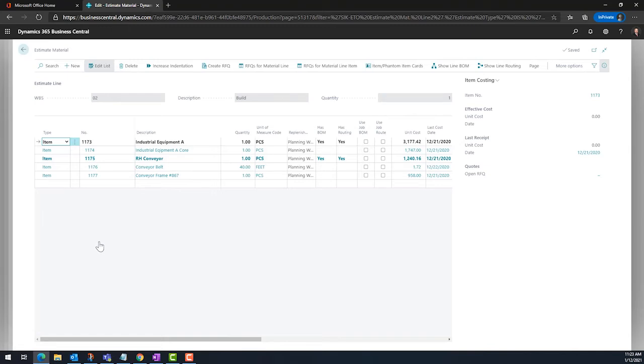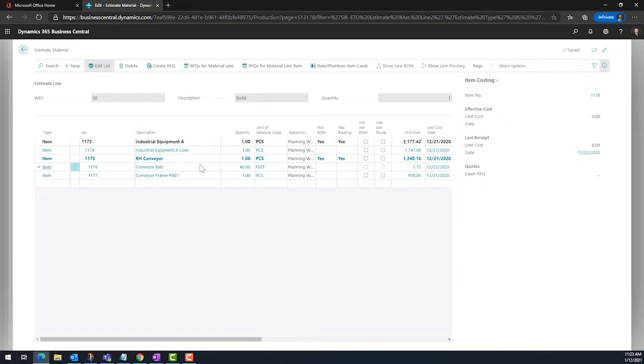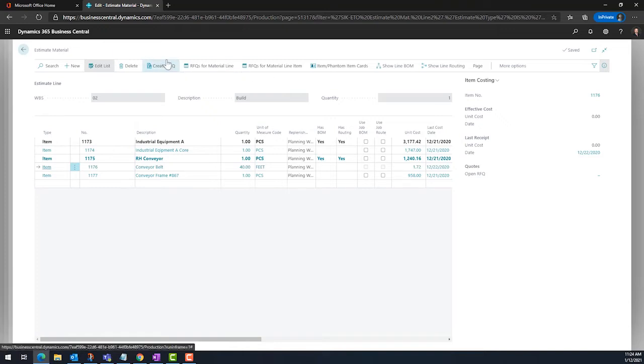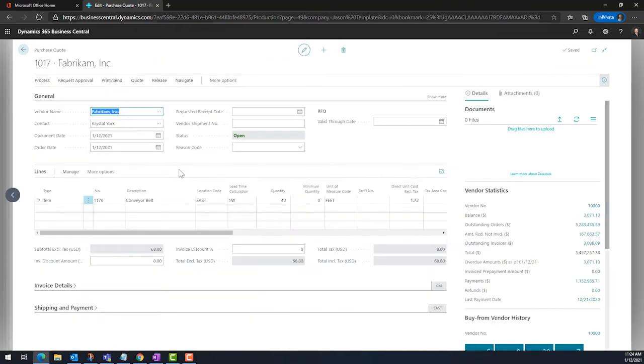Project estimates will capture the bill of material and the routing for the items that you will provide to your customers. A dedicated purchasing team will use the planning worksheet and its logic to optimize inventory levels, whereas the project manager is going to buy for their job only.